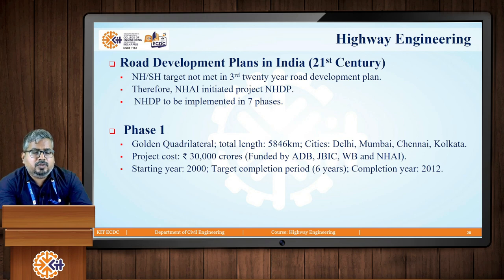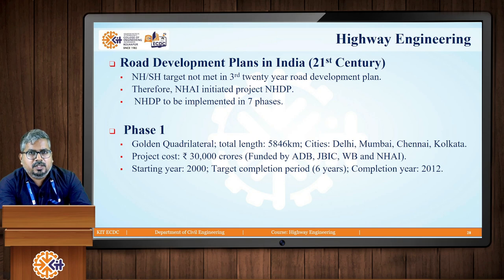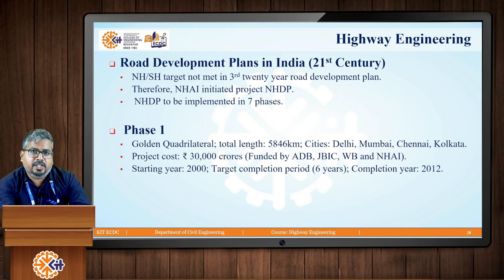Moving on to Phase 1, which is termed as the Golden Quadrilateral. In this case, four different major cities were considered: Delhi, Mumbai, Chennai, and Kolkata. The total road length considered was 5,846 kilometers. The estimated project cost was rupees 30,000 crores, funded by various world-class banks such as the World Bank, Asian Development Bank, Japan Bank of International Cooperation, and the National Highway Authority of India. This phase started in the year 2000 with a target completion of six years, but the actual completion year was 2012.